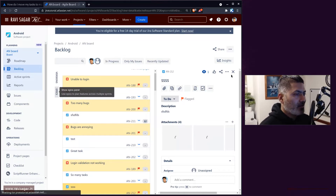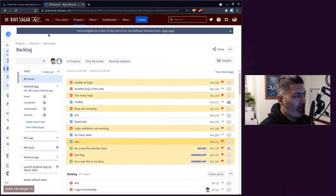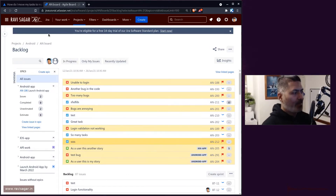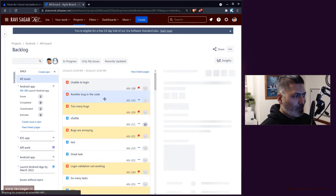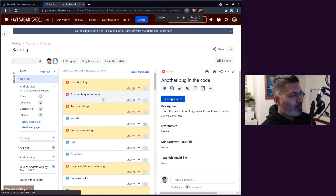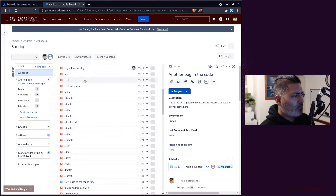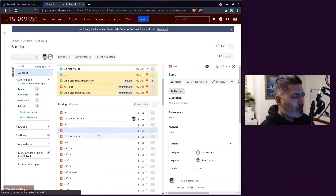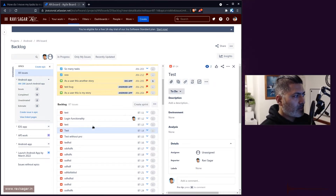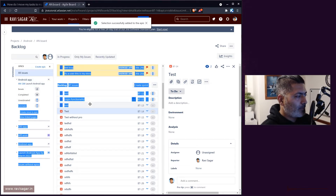In this project I have a backlog, and at the same time I have this panel on my board where I can see all the epics, which is very convenient. One way of doing it: if you're on the backlog view, you can simply drag your issues from the backlog to your epic.